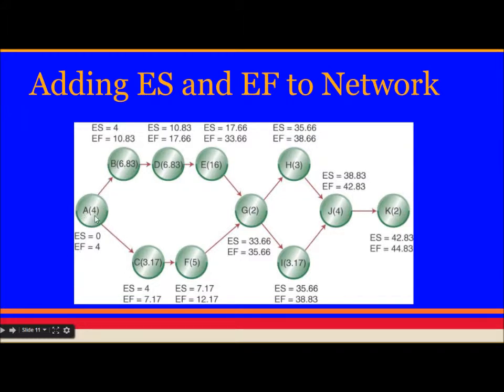For example, I will explain a bit here. For B, activity B, early start will be when A finishes. A finishes at 4. So early start will be 4. And early finish will be early start plus the duration of B. So 4 plus 6.83 will give early finish for B. So it will be 10.83. Similarly, you can do it for all the nodes.